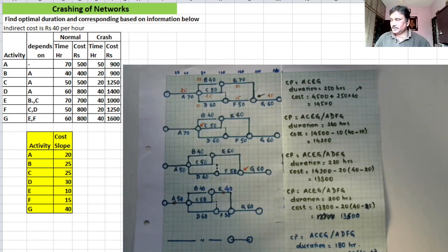I wanted you to involve yourself in the crashing activity so that heuristic is properly understood. Okay. Wherever you are thinking of crashing, you just find out the implications of crashing. Implications could be increasing the cost, or it could be buckling of